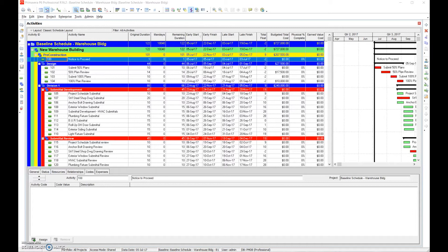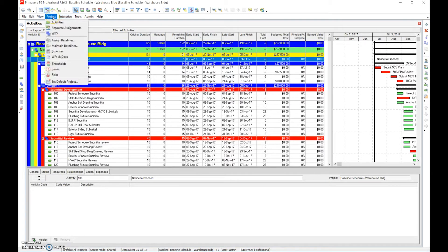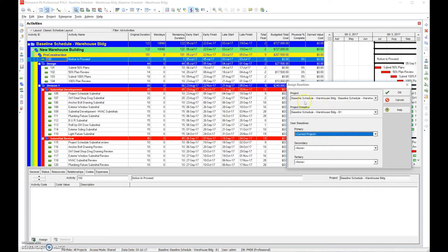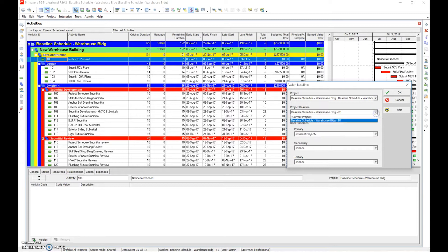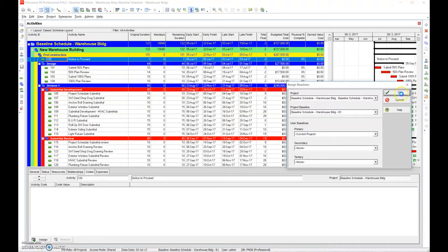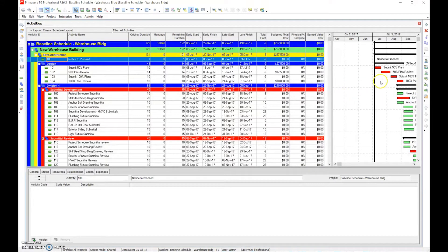Step 21 is schedule update. The first thing you do when you do a schedule update is check to see if the baseline is set. Go ahead and check: is the baseline actually set? Project baseline is set for this particular project. If it wasn't, we would set the baseline to the appropriate project. If you're not sure how to do that, you can go back to step number 17 and set it.